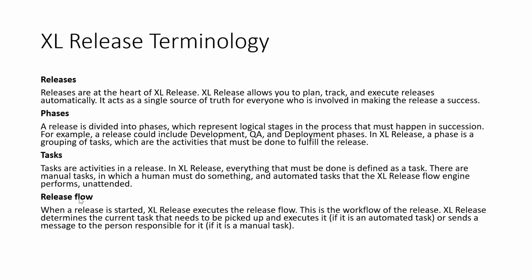So when we see the releases, you will see they have been designed into multiple phases. A release is divided into phases, which represent logical stages in the process that must happen in succession. For example, a release could include development, QA, and deployment phases, and stuff like that.